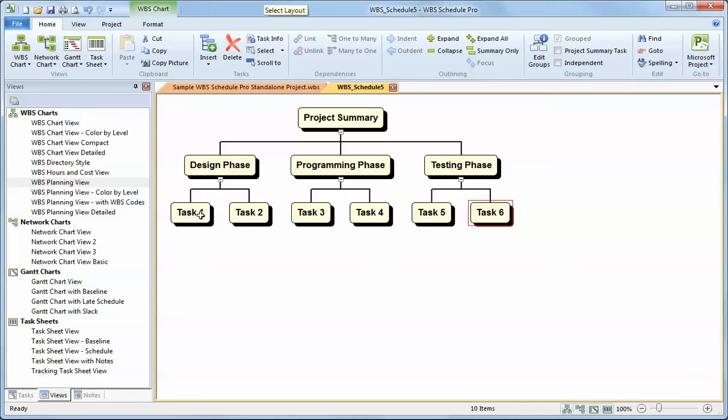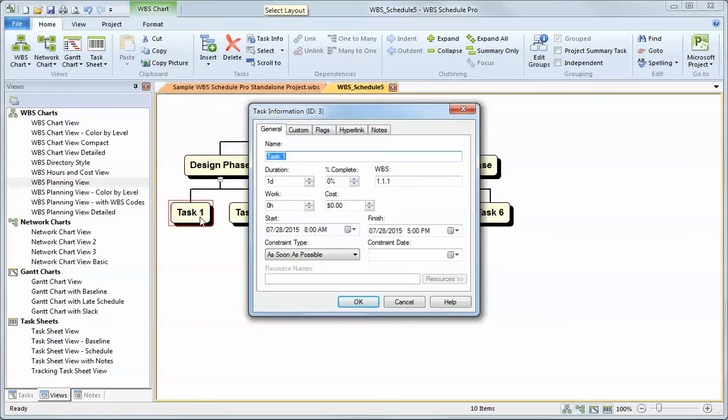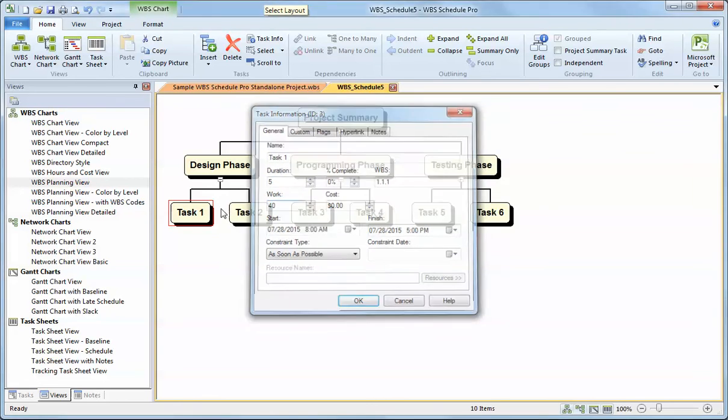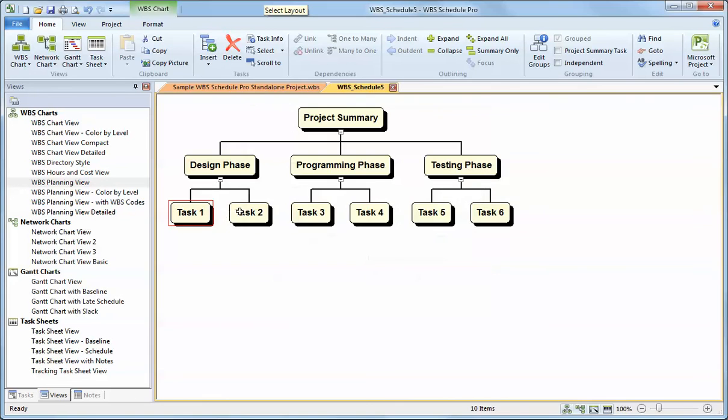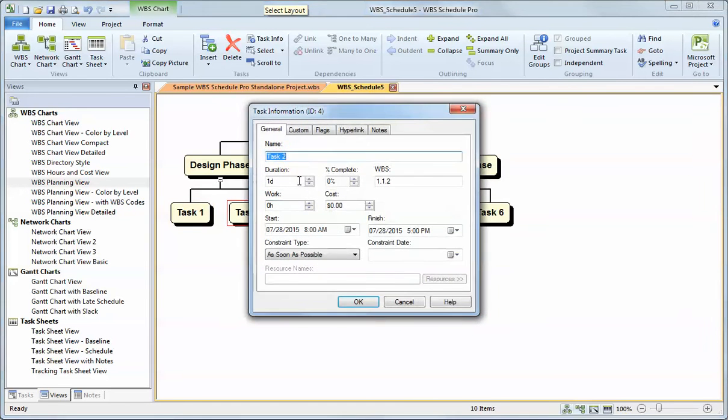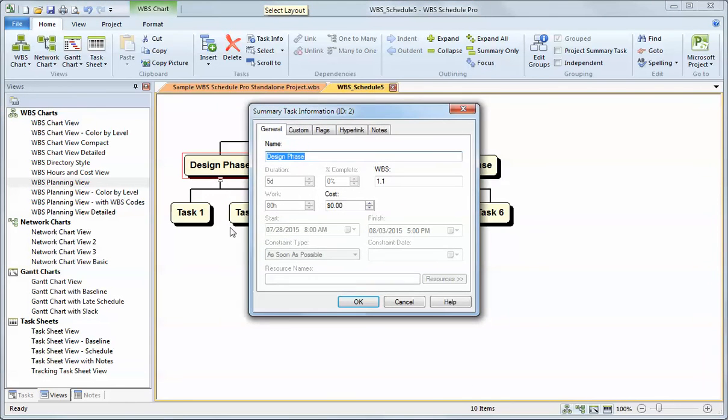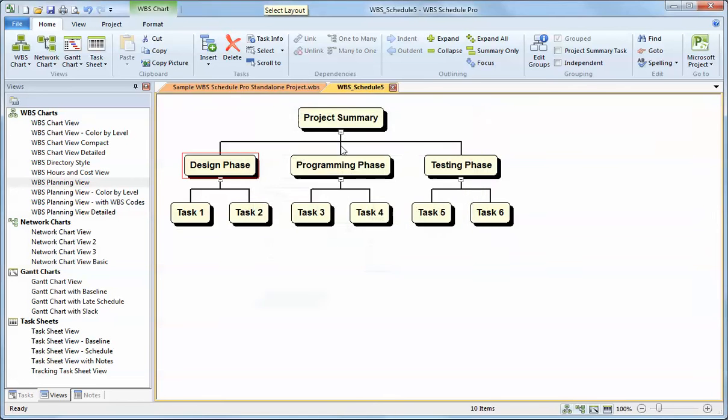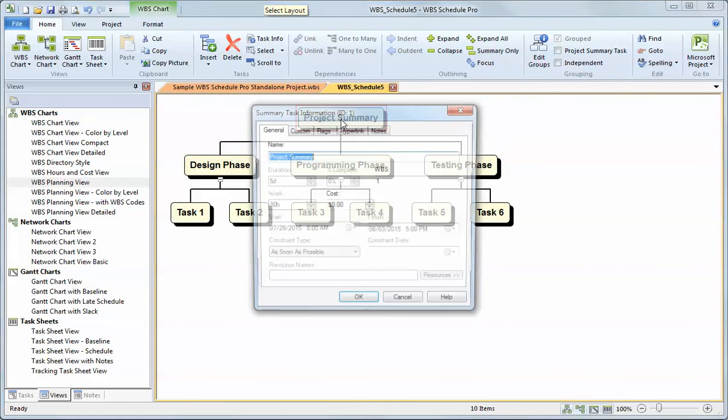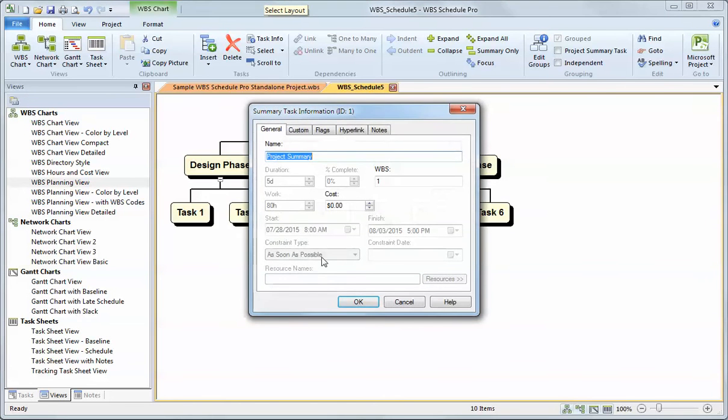I'll call this task one and task two. I'll just define this to be task three, task four. It's very generic here. But you get the idea. I can continue to break down the WBS as far as I need to go. When I'm breaking down the data, at the task level, if I double click on a task, I can enter information. I can enter durations. I can enter work. Task number two might be a week. So one W is the week. And require 40 hours of work. And I can see if I double click on the design task, it will roll up that information.